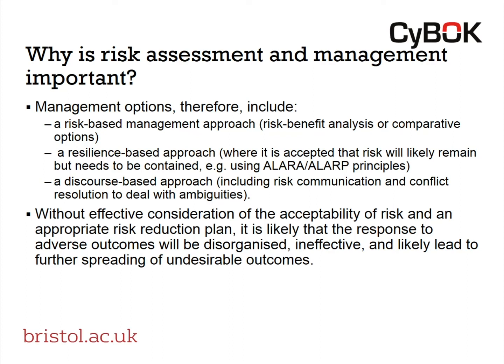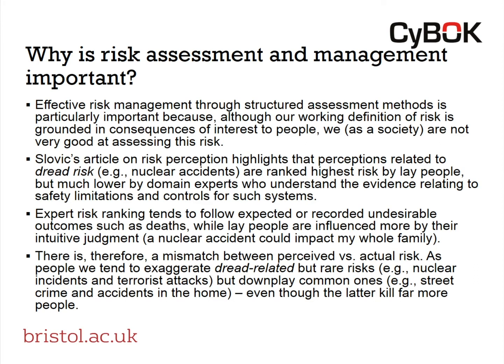So, to summarize, the management options include a risk-based management approach where you've got risk-benefit analysis, comparative options, a resilience-based approach where you try and reduce the risk as much as possible, and a discourse-based approach where you've got continual communication, constant conflict resolution, and dealing with ambiguities. Again, without effective consideration of the acceptability of risk and an appropriate plan, it's likely that the response to the outcomes is going to be disorganized, ineffective, and probably lead to further undesirable outcomes. So the importance of risk assessment is crucial here to ensure that doesn't happen.